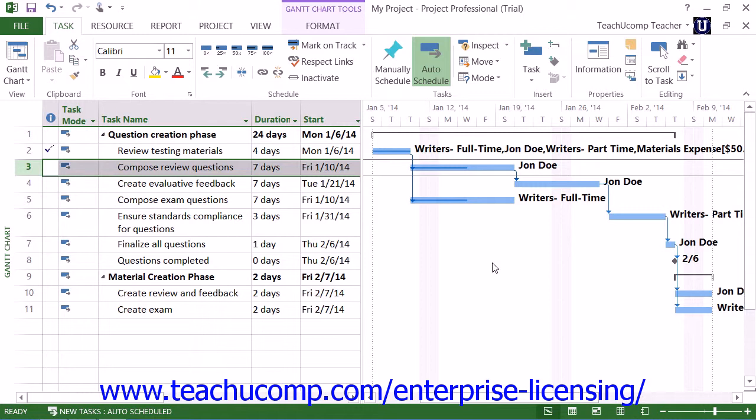You will often need to update the work performed on individual tasks within a project file. Often tasks with a long duration will need to have their completion progress measured and marked individually as the work is completed over time. When entering progress made on a selected task within a project file, you can either individually mark the percentage complete or the actual work values completed.